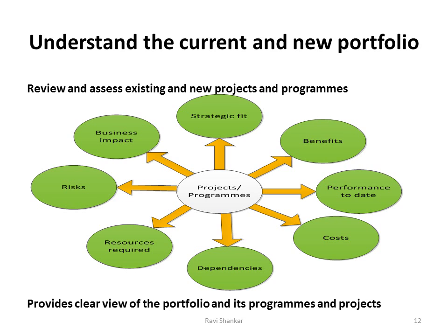If it depends on some other project which is going to be implemented 2 years, 3 years down the track, we need to review those scenarios. What resources are required for this project? What are the risks we have to implement this project? What's the business impact in terms of training, hiring people, or a functional change?